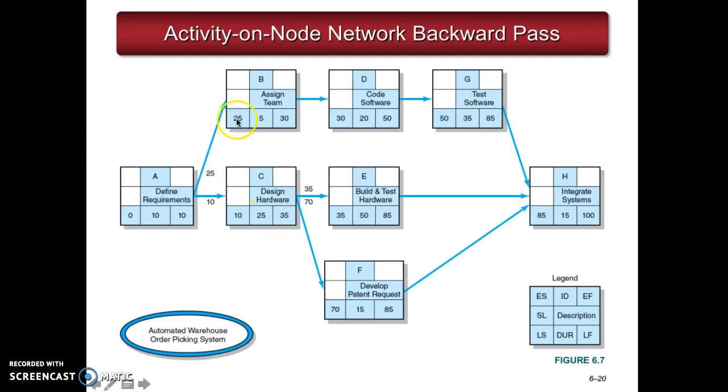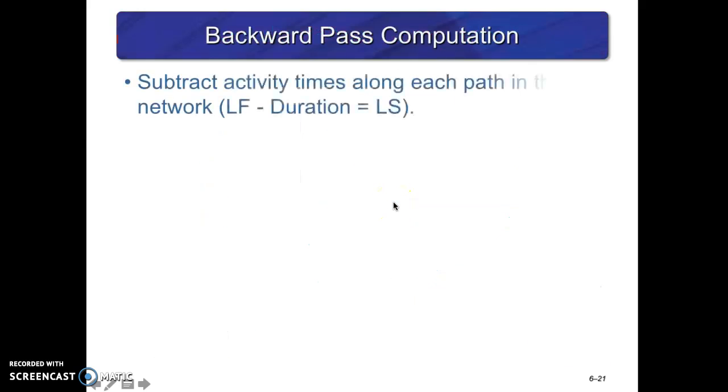And so you can compare between 25 and 10. So here, if you do that, 85 minus 50 becomes 35, 85 minus 15 becomes 70. Look for the smallest number: 35 minus 25 is 10. Between 10 and 25, the smallest is 10, and 10 minus 10 becomes 0. So now you have early start, early finish, late start, late finish. They'll give you a better picture.